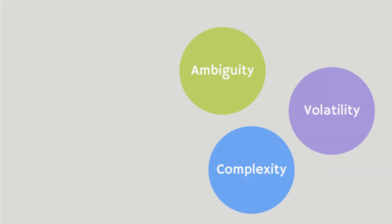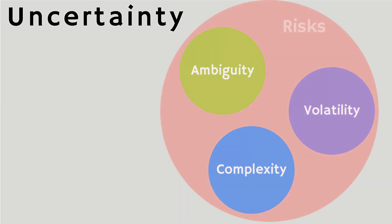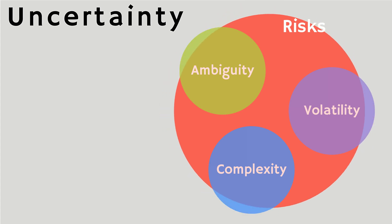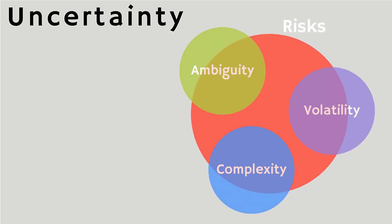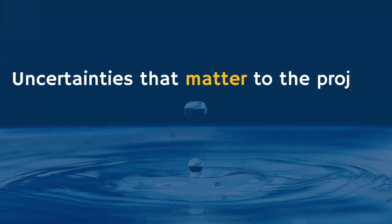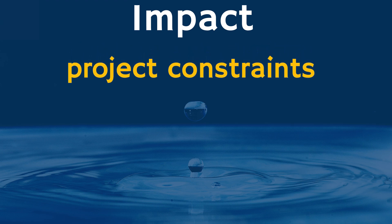So far we saw that ambiguity, complexity, and volatility are shades of uncertainty. Are these conditions risks? The answer is not necessarily. For any uncertainty to be classified as a risk, there are two main conditions to be met. First, risks are uncertainties that matter to the project — the uncertainties must have an impact on the project objectives or constraints to be called risks.